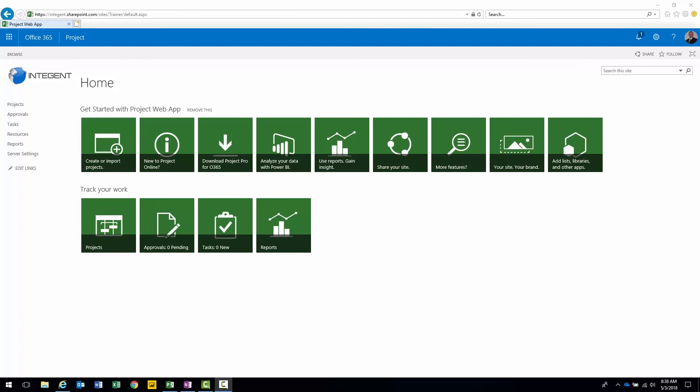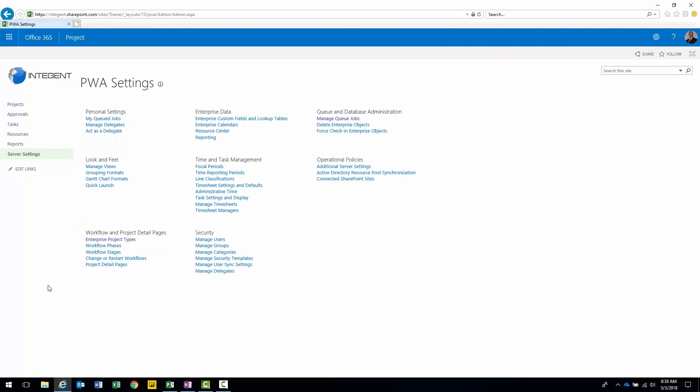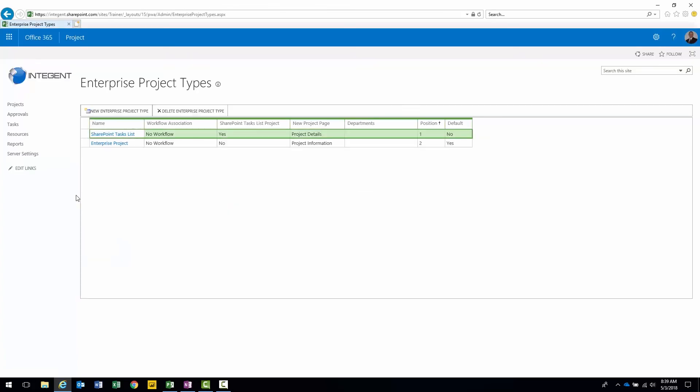Welcome back to lesson three in creating a custom project site template. Now we're going to actually associate that template with an EPT and then test that the template is utilized and ensure that our changes came forward. How do we associate that new template with our EPT? Follow these steps. Go to server settings. Under workflow and project detail pages there is an option for enterprise project types. Let's go ahead and select that. We'll take note of what we have for EPTs right now. The only one we have for projects is called enterprise project. If we look all the way over to the right, it is currently specified as the default. Therefore this is the one that we actually want to make modifications to.